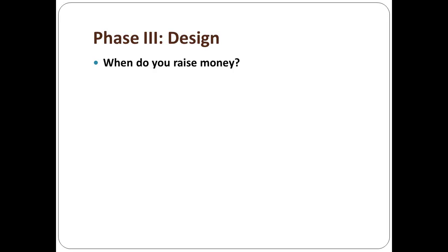So for the whole process, from the time you begin to decide who you're going to interview to hire as a consultant, to the time that you've handed out the pledges and gotten them back, I've been told you're going to need to reserve between 6 and 9 months, and I would say lean toward 9 months, maybe even 9 months to a year, start to finish. And then, of course, your pledges, your church family, your contributors are going to be giving money for the length that you've stated. Usually it's 3 years.